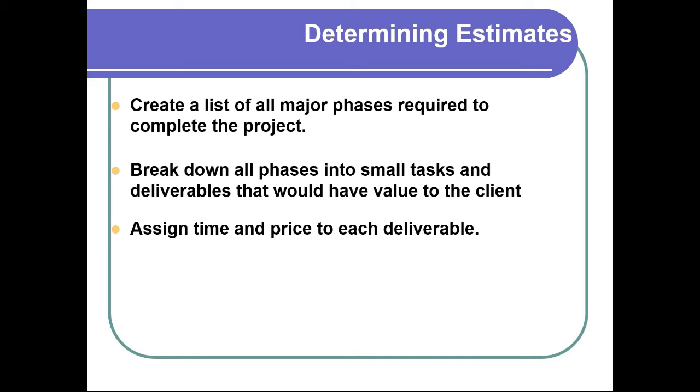So you think, well, how long is it going to take me to actually develop this survey? I've got some questions from before, so maybe I can pull those together, but not all of them. So maybe, I don't know, maybe 20 hours, right? So you say, okay, this is 20 hours. Now, in our company, how much is 20 hours worth?